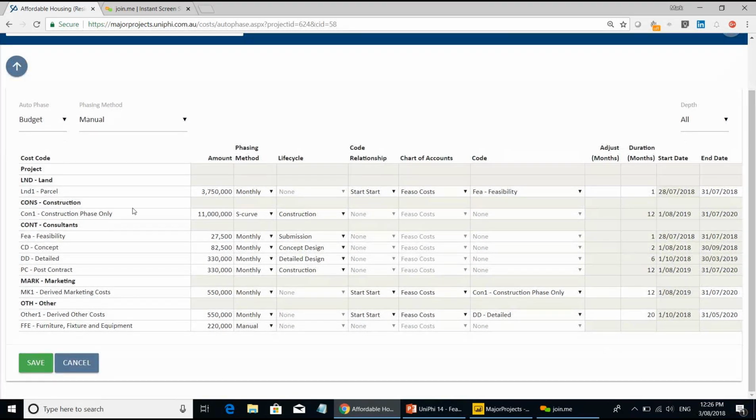We're using our construction S-curve, and we're using our construction life cycle dates. So these dates aren't editable. They just basically come from the schedule that people have set up for the system. So you change the schedule, the dates change. And remember, we're using that date to decide when people move in, so that would have a knock-on effect on the revenue side of the equation that we looked at before.